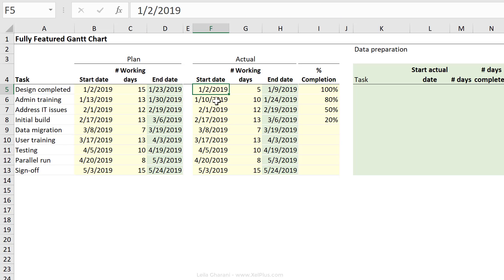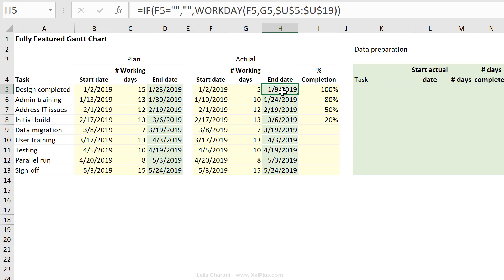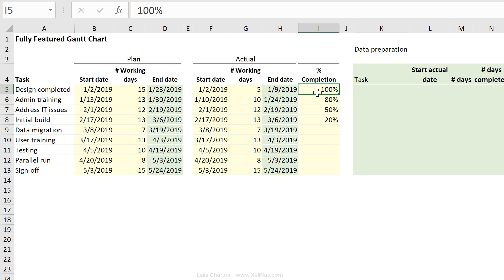Here is the actual data. Once we come to actually do the task, we're going to update the start date, the number of working days, and end date is going to be automatically calculated. We're also going to manually update the percentage completed for that task. For example, the second task here is 80% complete. Once we finalize the task, we're going to update this to 100%. Now we want to create a Gantt chart that's going to show all of this in one view.